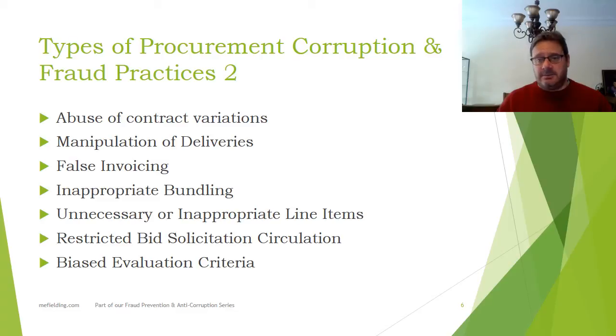We only send copies of the tender documents to certain people. Having said that, certainly most big tenders for government work, we were doing some stuff on fraud and corruption the other day, it's 1.8 million euros. To get the documents to be able to tender, you have to pay. So what they're doing is, first of all, deterring people, because it's a few thousand dollars, who aren't serious bidders. And secondly, they're recovering some of the cost of the procurement process. I thought it was very clever. Lots of people do that. So number 2, restricted bid solicitation circulation. I must think when I'm writing these things.